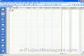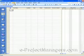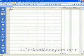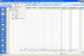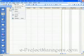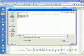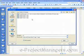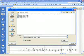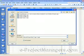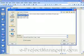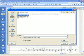then you go to the top menu item and look for the word Insert. Click on the menu item Insert and look for the submenu item Project. And when you click on Project, you'll see a dialog box that pops up. And you would go to the location where your project schedules are located that you want to add into the master schedule.